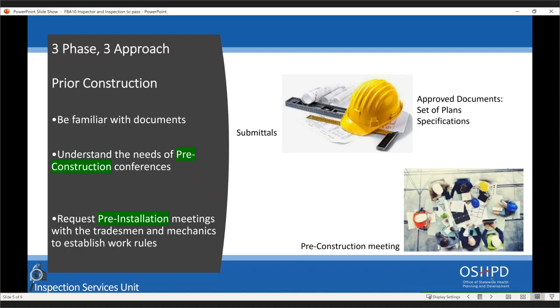I want to talk about 3 phases of inspection. I call it the pre-install phase, and that's where the most work has got to take place. You do your work up front, the end of the job is simple. Then you have the actual inspection, which should be the easiest. And then at the end of it, after your inspections on a daily basis, you should post metrics on how well inspections are doing. What we're trying to achieve is a very high percentage of inspection requests, or IRs, that get closed on the first review.